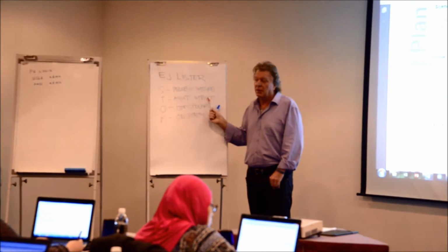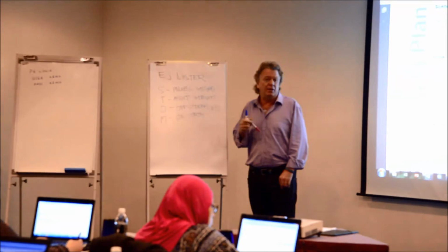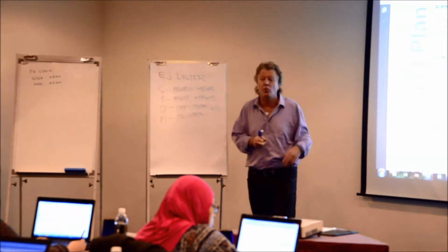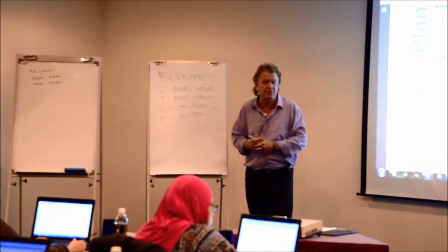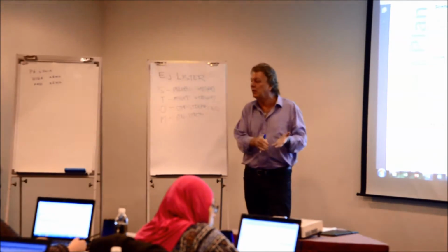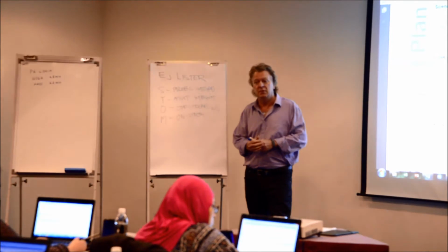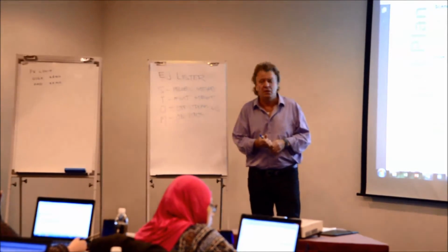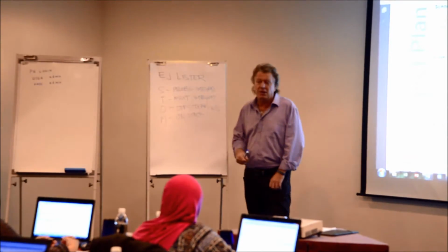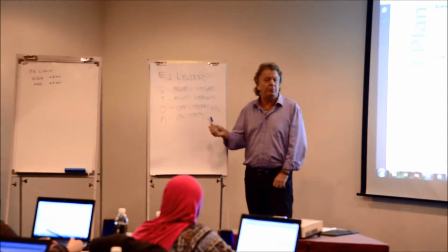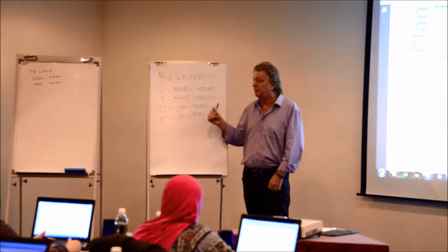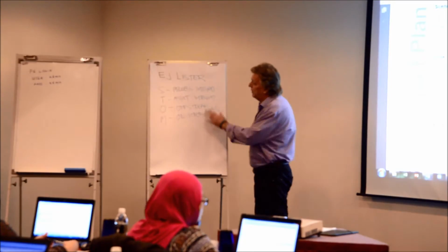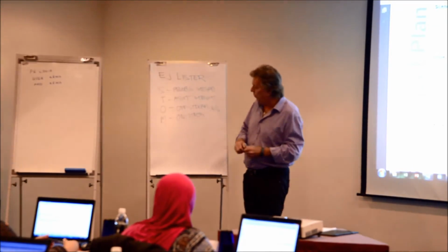Turnarounds are never unplanned. We plan them for years, in a 20-year plan, right? We know for 20 years that we have to do a turnaround every 3 years or 5 years, and we know the equipment. It's not a secret. Unless we modify the plant, we know what we're going to work on, okay? In the outage, it could be on a piece of equipment, it could be in a unit, on a system, same with our maintenance.